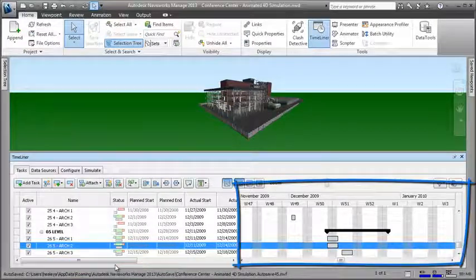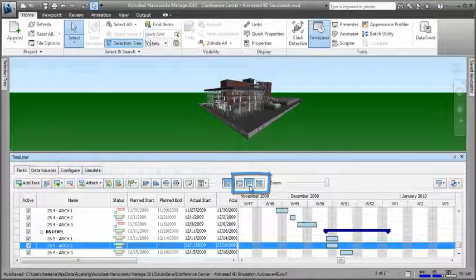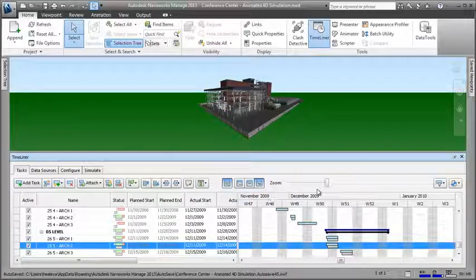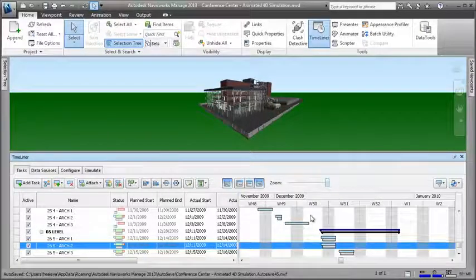The Gantt chart on the right hand side of the Tasks tab provides a visual representation of your schedule. I can choose to display planned dates for the tasks, actual dates the tasks were performed on, or both. I can zoom in and out on the schedule and move tasks and change their duration and dates.